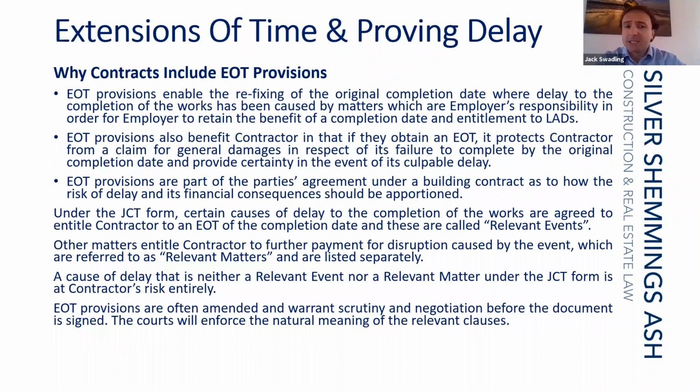Brief note here on why contracts include extension of time provisions. So, first, they enable the refixing of the original completion date, where delay to the completion of the works has been caused by matters which are the employer's responsibility, in order for the employer to retain the benefit of a completion date and entitlement to LADs.